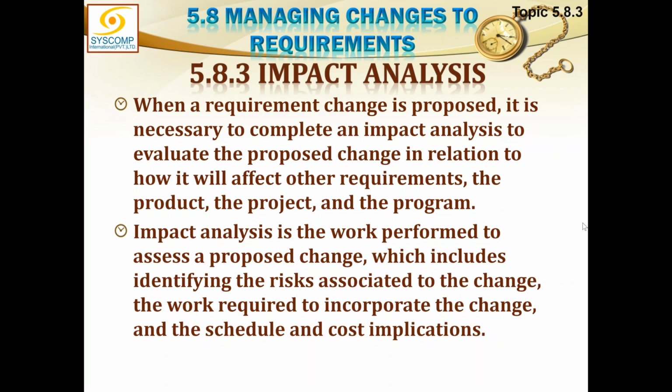Okay, 5.8.3, that is impact analysis. When a requirement change is proposed, it is necessary to complete an impact analysis to evaluate the proposed change in relation to how it will affect other requirements, the product, the project, and the program, the whole of its environment. So as soon as the requirement change is proposed, you must check it for any impact creation. You must analyze it for any impact on this requirement, related requirements, other requirements, the whole product, the whole project, or the program, whatever.